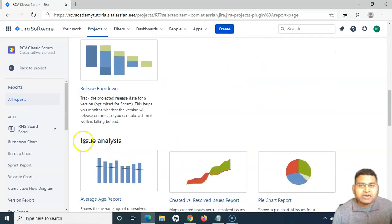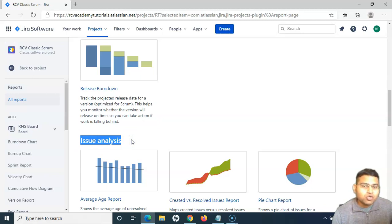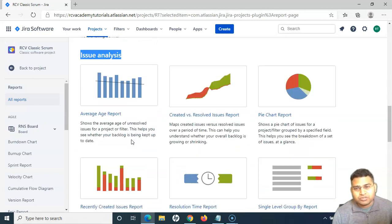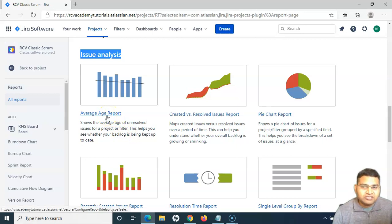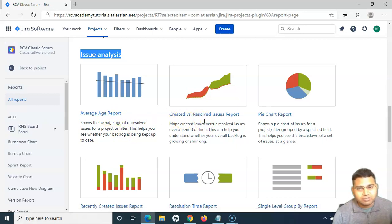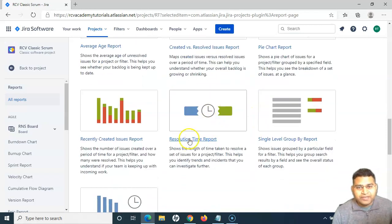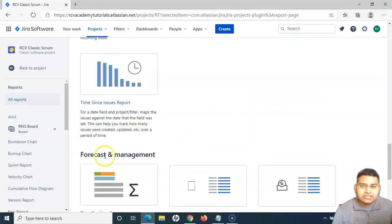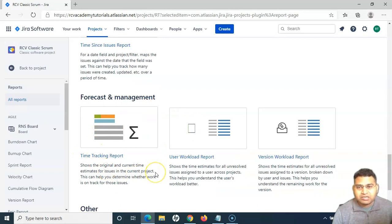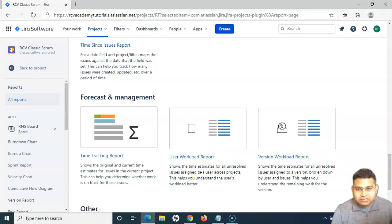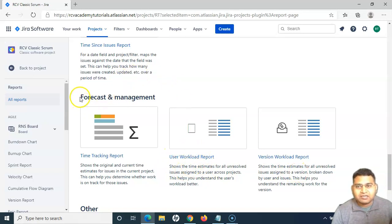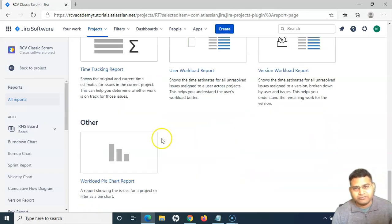The next category is issue analysis. If you want to analyze the issues — for example, average age report or created versus resolved issues report — these are the reports available to analyze issues within the project. Then we have the forecast and management reports, which are around time tracking or workload — version workload, what sort of workload is there for a particular user or version. That comes into the forecast and management section.